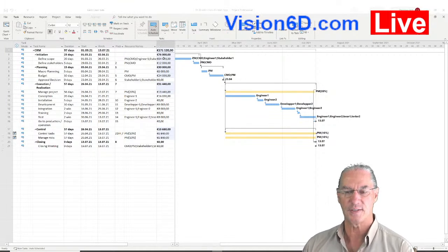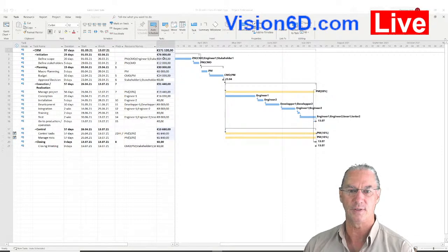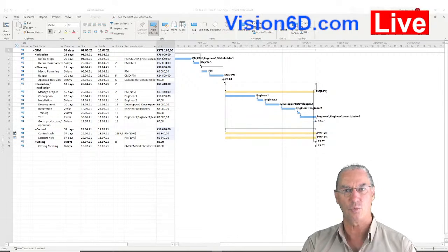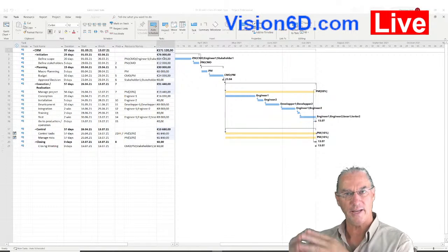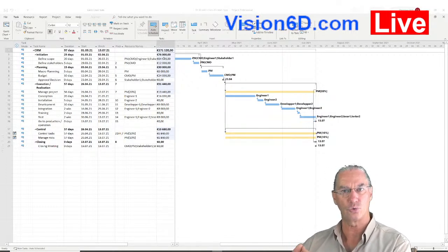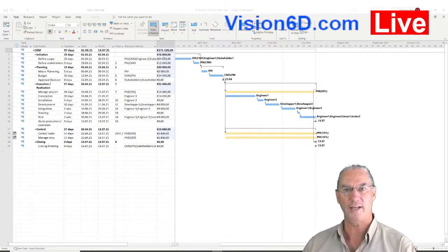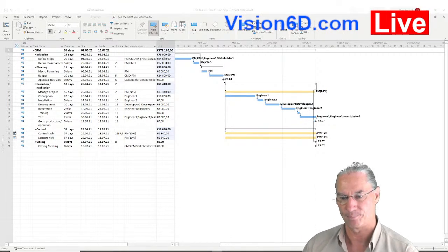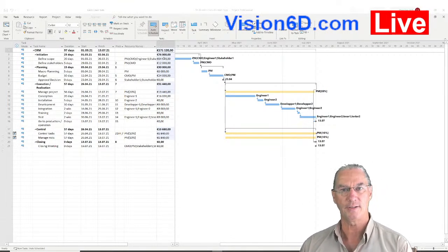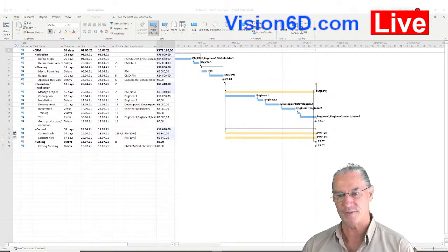In many companies this doesn't show so much because they do project costing in a different way. They cost what they have to buy, and they say that the people within the company have to work anyway, so we don't need to pay extra for them. They are here, they have to work on the project, so we don't do that kind of calculation. This is absolutely correct for the costs. There is this way to do it.